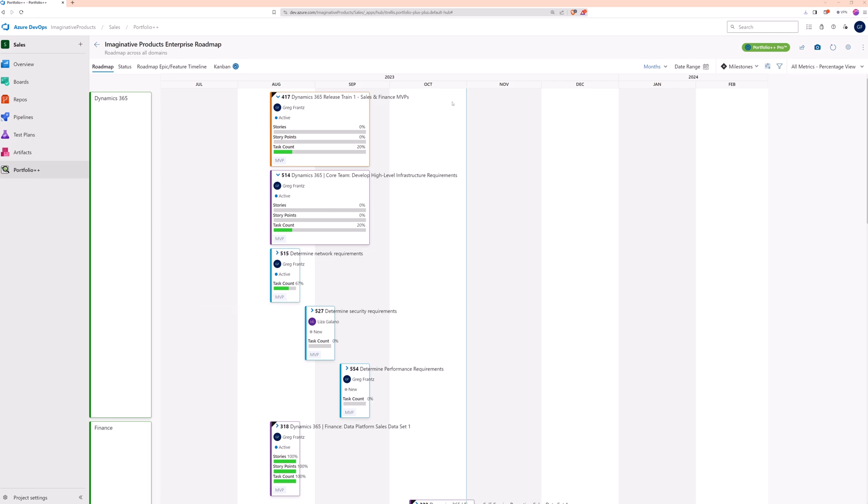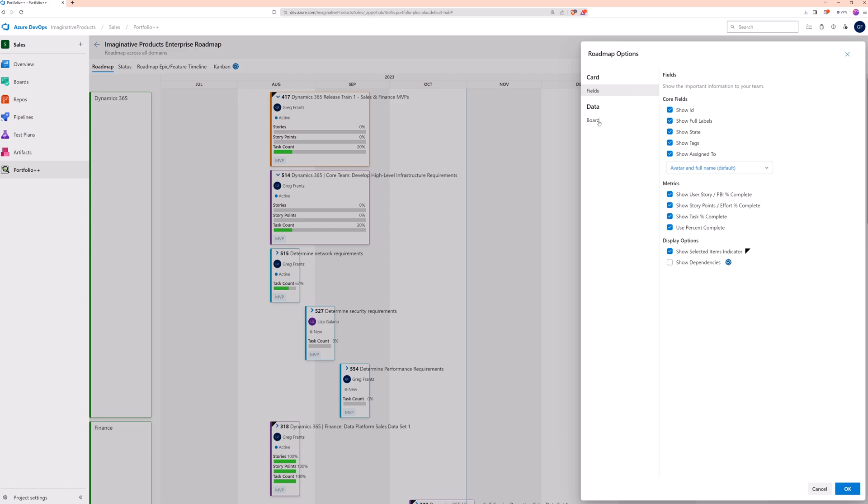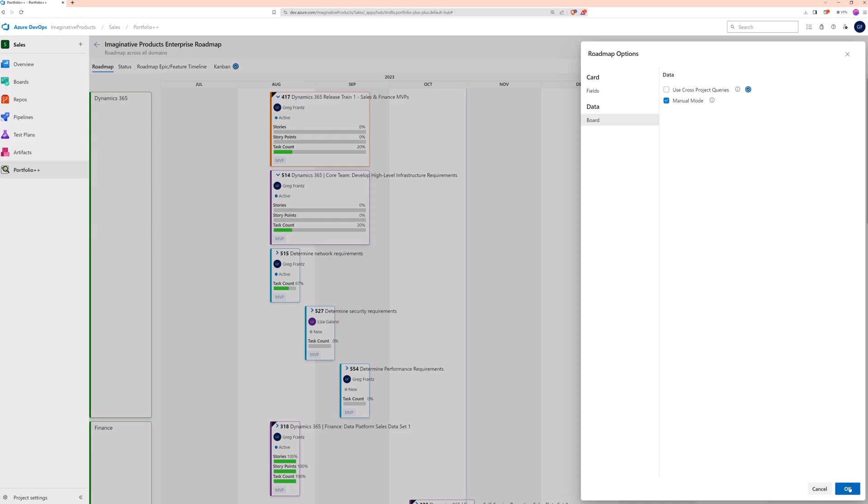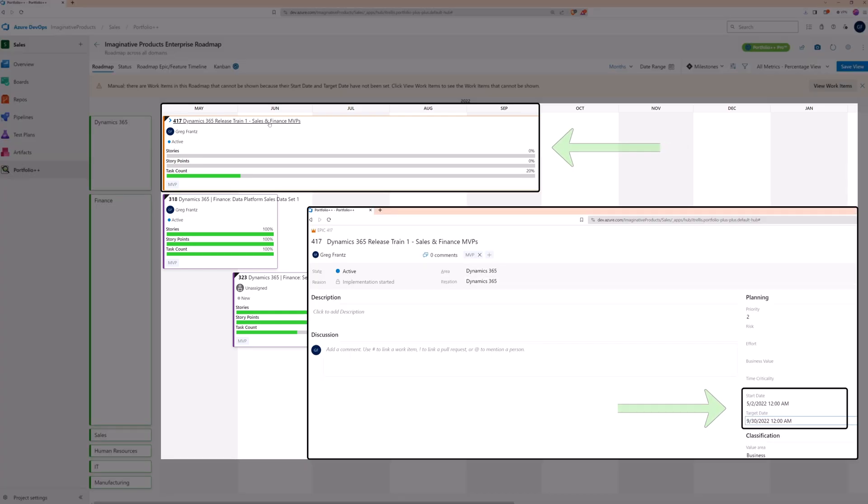Let's go back to the roadmap options to look at a couple more things. First, is manual mode. This will build the roadmap based on dates entered on work items. This is helpful at the beginning of projects when trying to express when work will occur for budget approval or setting team expectations. See, now the work item spans the dates that are entered on it.